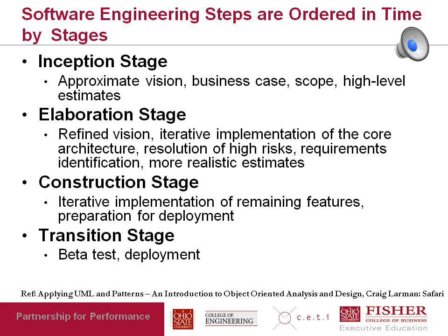But before that, there will also be a much more detailed requirements identification, and there will be more realistic estimates. Once the elaboration stage is done, essentially what this means is you now know how to do the work and how much it's going to cost, and now you can do things in much more of a cookie cutter or standard manner. The project will then move into a construction stage where you're simply adding features, but you know how to do them. Okay?